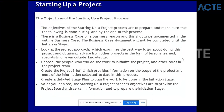The objectives of Starting Up a Project are to prepare and make sure the following is done during the end of the process: there should be a business reason documented in the outline business case. The business case document will not be completed until the initiation stage. So we'll start a business case but we will not finish it - the end of the business case is only in the initiation stage - because in starting up the project you are only at a high level.